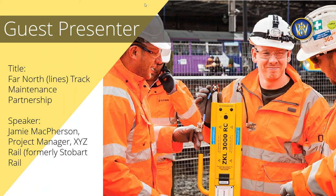I mean, that Thurso branch line, that's 6 miles, and there was a lot of faults on that line. And we removed quite a bit of them. That was a headache, but it was really good to see the end product. There was one site right in Inverness that had seized clips, which was a nightmare. We were using a Melville clipping machine, and that couldn't even do it. We were using lube, spray, all sorts, just couldn't get it. That was a nightmare site. We actually had to change the sleeper instead of just repadding it.